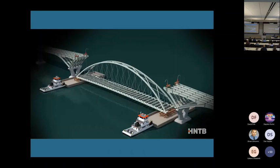It doesn't much matter. But the idea here is this is over a landlocked lake. There's no monster cranes you're going to bring and set up, and that would have delayed the project. So here, the approaches are designed to pick the bridge up. So this is all strand jacks on the end of the approaches. And the amount the approaches project out to grab the arch is the width of the barge. How do we know what the width of the barge is? That's the size of the lock. Yeah, so we knew all of this stuff coming in.